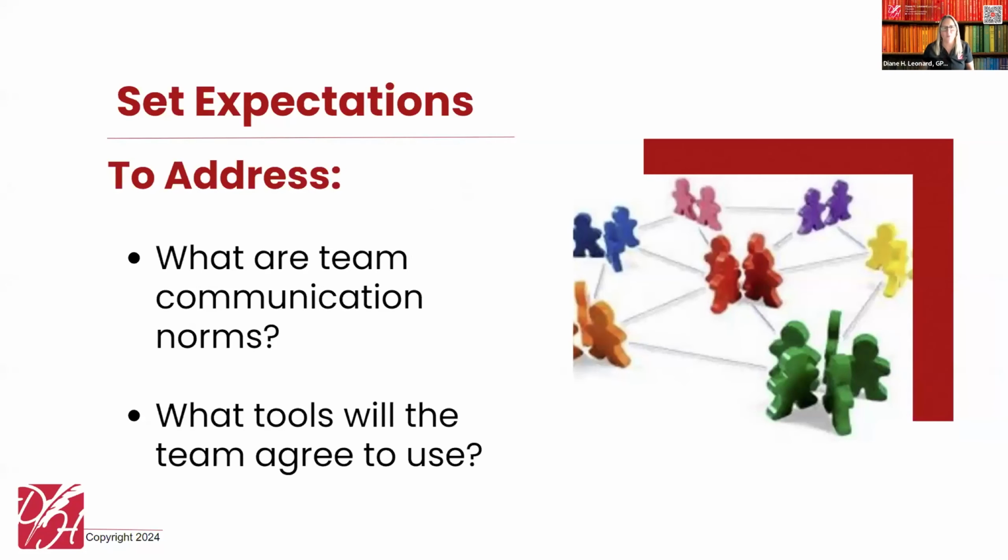They have also usually taken the time to set expectations, setting maybe a formal team working agreement. That's a phrase that comes from a lot of agile project management. But what is it that we're here to do together? What is our heart-centered purpose? What are the different roles and skills that are being brought to the table? Where and how do we communicate? If we're all internal, you might say, oh, well, Diane, we're all going to be on Teams.